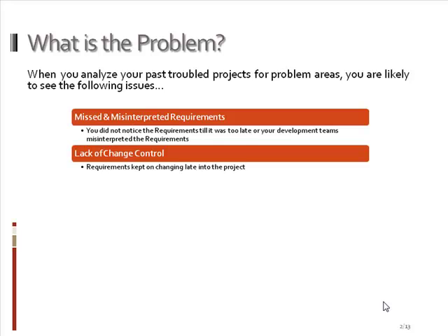This typically happens when requirements keep on changing till late into the project, and typically, if you are not aware of this change or if you do not control it properly, what ends up happening is either the delivery date gets pushed out or the quality of the end delivery code suffers.